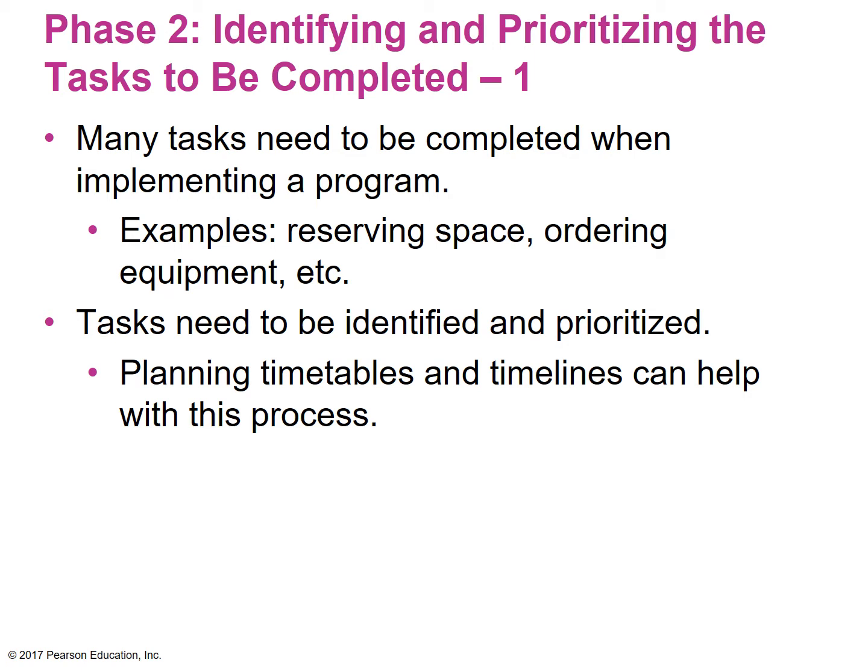And you also want to think about, is there some type of sequential order in which I need to address these activities? So that's where the prioritizing comes into play. You want to make sure that if certain activities are needed in order to realize your short-term outcomes, well then you better make sure you have those particular resources on hand and have those activities deployed so that you can in fact have a shot at meeting your short-term outcomes.